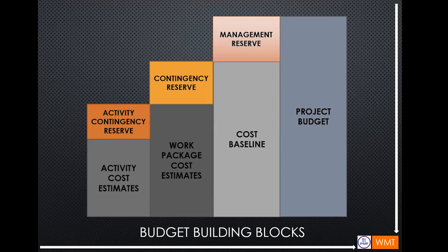So the cost baseline can be changed, but it will need to be approved. It will go through the perform integrated change control process. So once approved, the additional cost will be taken from the management reserve. But hopefully the management reserve is still there, because the management reserve is not controlled by the project manager. The project manager only controls the contingency reserve.